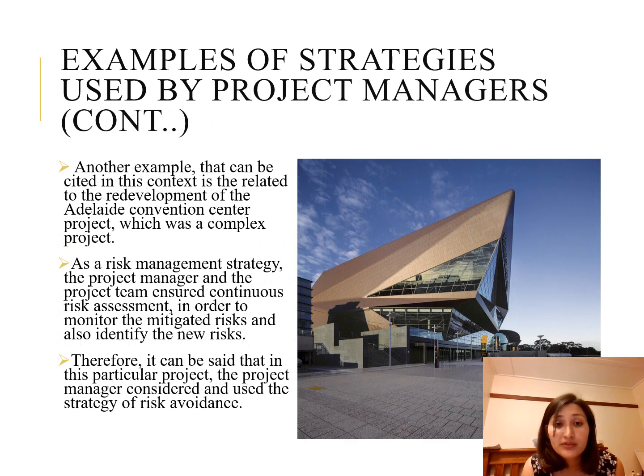Another real example related to the topic is provided in the slide. The redevelopment of Adelaide Convention Centre project was a success mostly because of the adequacy of the risk management process. As a risk management strategy, the project manager and the project team ensured continuous risk assessment in order to monitor the mitigated risks and also identify the new risks. Therefore, it can be said that in this particular project, the project manager considered and used the strategy of risk avoidance.